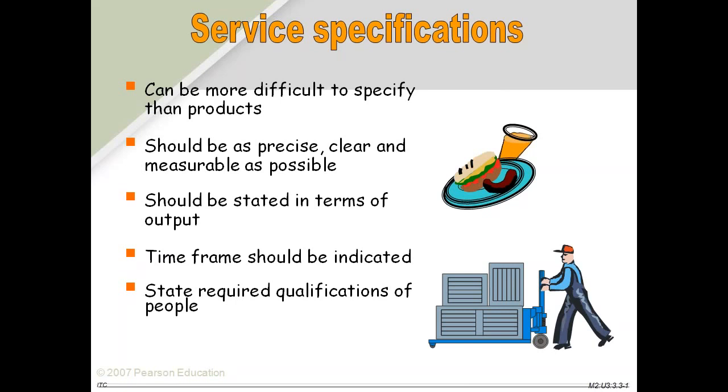So this is where, in the service part, you need to spell it out. If I had to write down the service specs, firstly we'll say the bigger picture. The preface will say, okay, this service is required for so-and-so organization, and the broad purpose is this. Then we'll spell out the deliverables. What deliverables are required from the consulting company? After we have spelled out the deliverables, then we can go down. Next is, okay, how do I assess it? How do I check it?